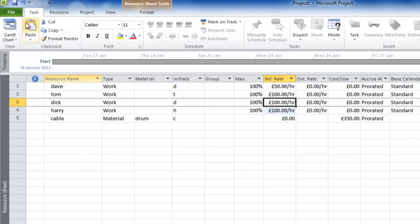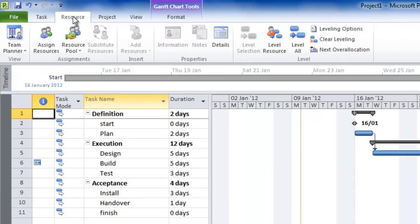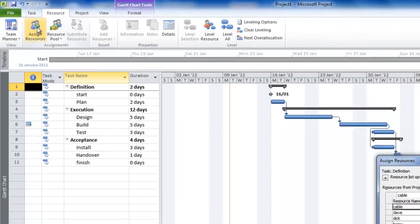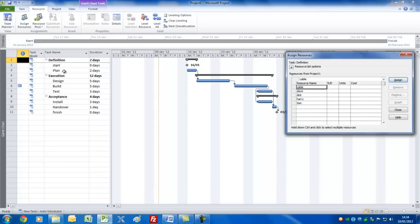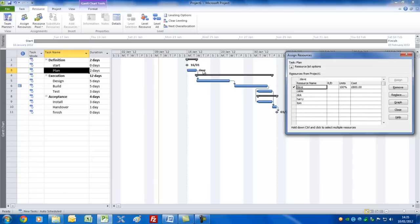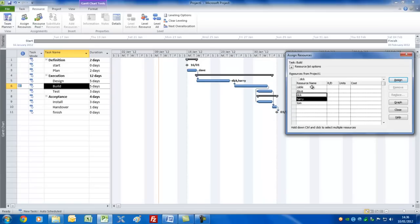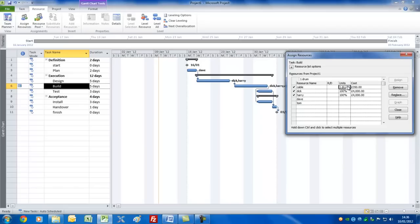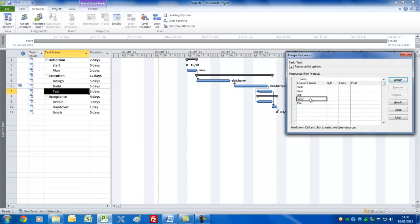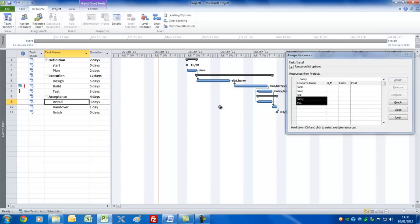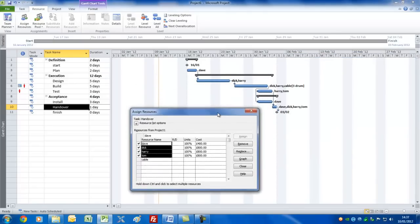Let's go back to the Gantt chart view and assign the resources to the tasks. Click the Resource tab and click on the Assign Resources command. This gives you an Assign Resources box. Click on the Plan task, click on Dave, and click Assign — Dave's name appears to the right of that task. For Design, let's put Dick and Harry on that — select those and press Assign. For Build, we'll have Dick, Harry, and Cable. Hold down the Control button to select non-contiguous resources. For the cable, we'll have three drums. For Test, Tom and Harry. For Install, Dave. For Handover, everyone apart from Cable.